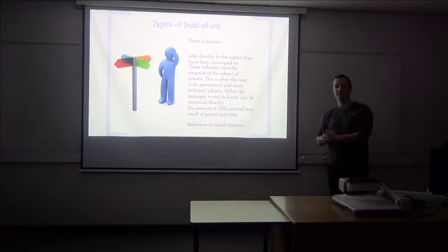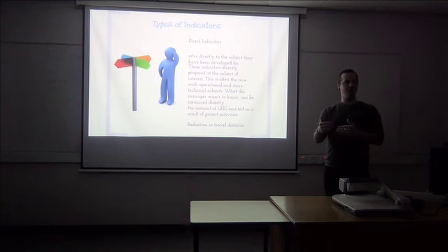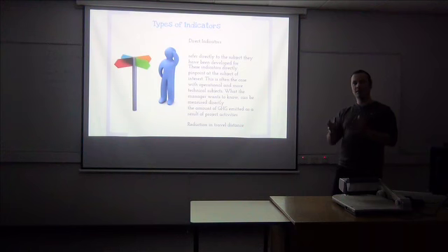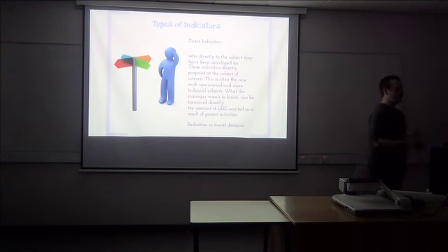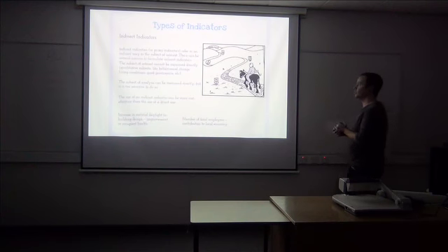Reduction in travel distance, very simple one. Okay, direct indicator. The amount of miles we've travelled in our cars, add them all up. That's our travel distance, okay? Very easy, simple to do. So indicators like that are used commonly. So where possible, we always try to use direct indicators.